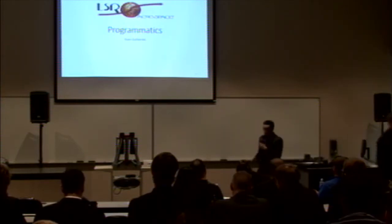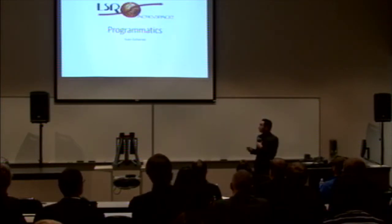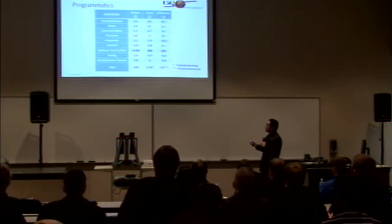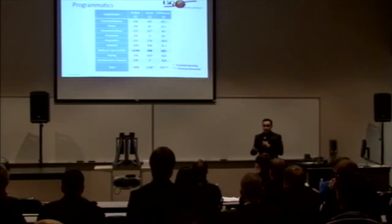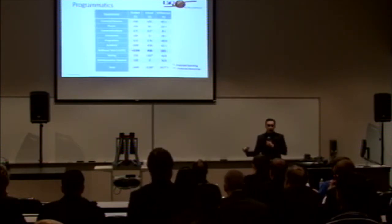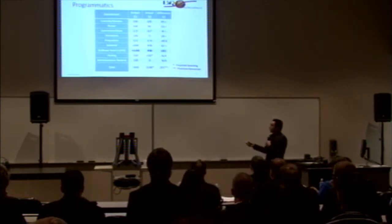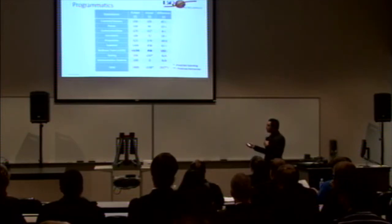Thank you, Joe. My name is Juan Gutierrez, and I'll be presenting the programmatics of this project. Here you can see a summary for our subsystems and allocated budget. We have a buffer of 50% additional funds in order to have an expected cost associated with it, and also unaccounted for costs that we haven't thought about. For testing and simulated testing, we have $150 allocated. This includes building and testing apparatus and other associated costs with testing.